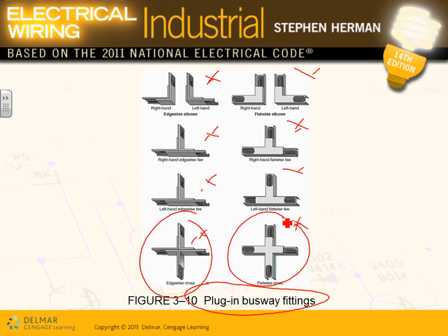So what's in it for you, Derek, when you start working for all these electrical contractors and you have a busway system and you're doing estimating, guess what? Every time you're going to cross like this, you have to go, okay, am I doing edgewise or flat? I know you guys are not going to be torquing these, you're not an electrician, but if you are working for electrical contractors, especially, you're going to be taking off the system. You have to know a few things about the hardware. These are the most important fittings that they use to walk you. Remember, you're moving through this plant in 3 dimensions.